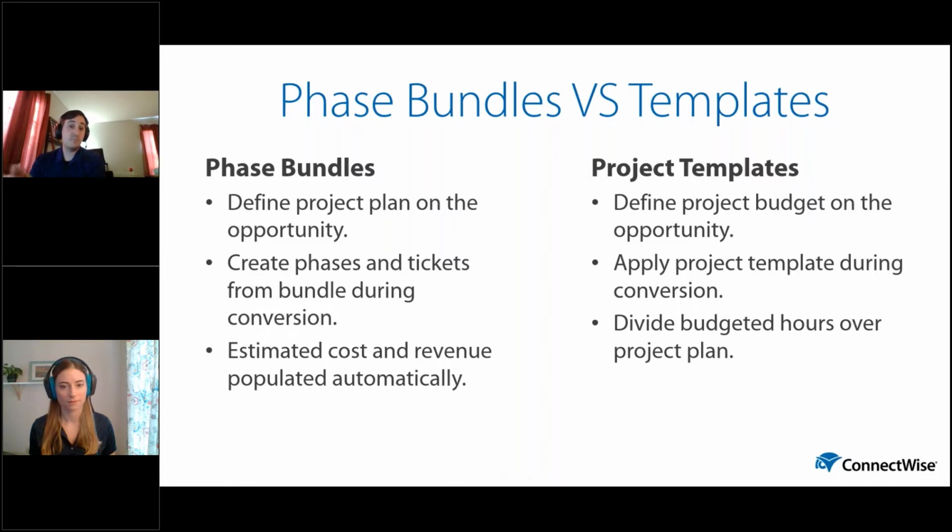Then your project team will take the budgeted hours and divide that up over our template. So we can see how much time we quoted to the customer, and we can use that time to then assign out to the various project tasks we have, so we can use that time to its fullest over our proposed plan.